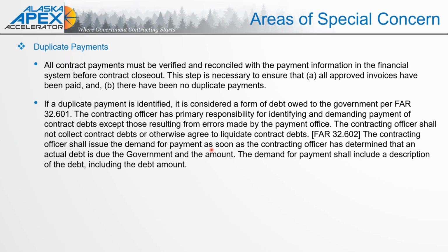Okay, duplicate payments, we kind of talked about this again. Keep in mind, one of those clauses in your SAM profile, that whole 52.209-7, that responsibility matters, part of what you're signing in SAM and with each contract is that duplicate payments and that responsibility to inform the government if they overpaid. Even if it is $1 or a penny, you have that responsibility.